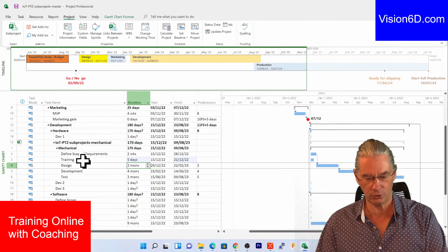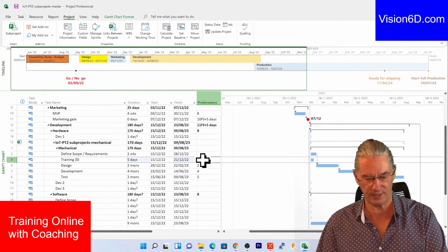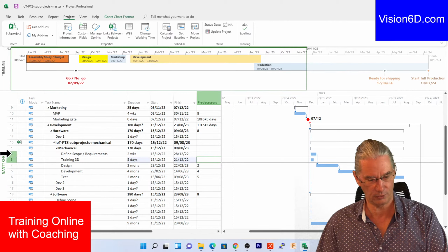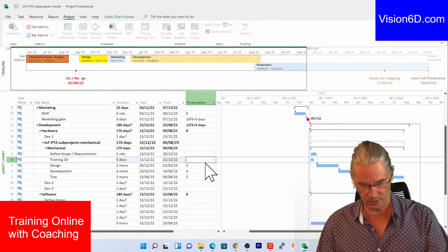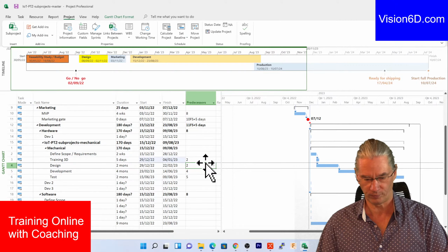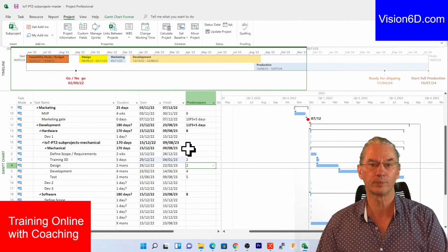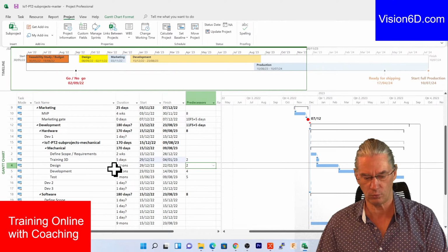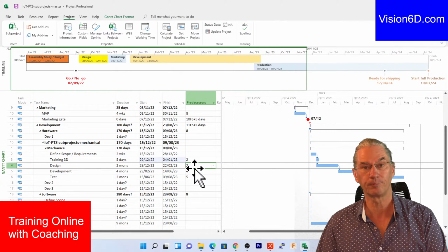So I'm going to say that the 3D training had as predecessor which task? I could say that it could have task number 2. So let's see what happens if I say here task number 2. So with no surprise, it has now positioned the training at the same time as we start the design.